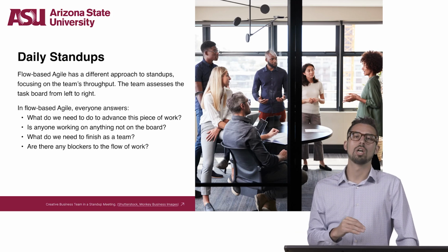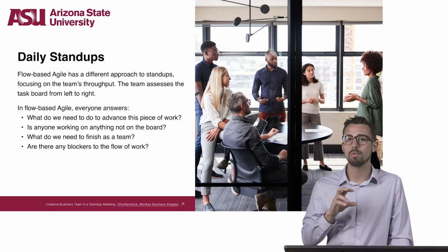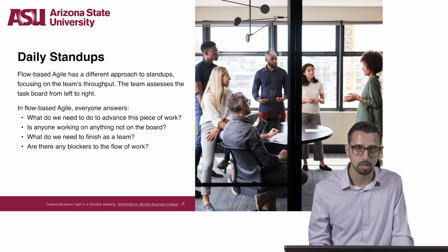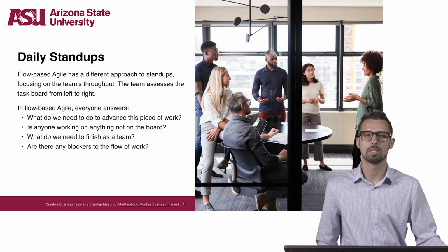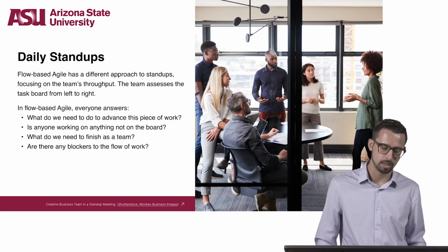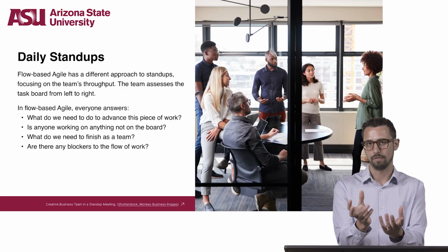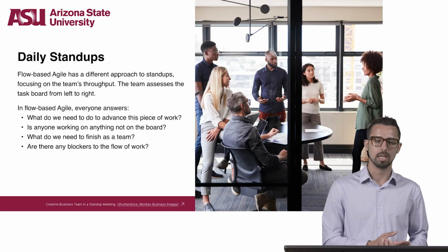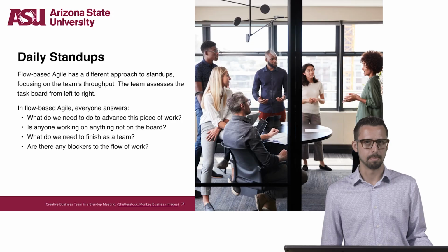The questions are, what do we need in order to advance this piece of work? Is anyone working on anything that is not on the board? What do we need to finish as a team? And are there any bottlenecks or blockers to the flow of work? Notice that this approach is less individualized and much more focused on a team. And again, flow-based Agile is more like a Kanban board.